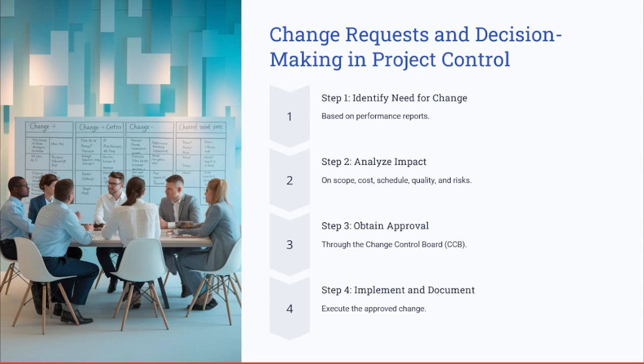Let's understand how the decision-making process works when handling change requests within project control. The first step is identifying the need for change. It's based on the performance report, the stakeholder needs, and deliverables audits.